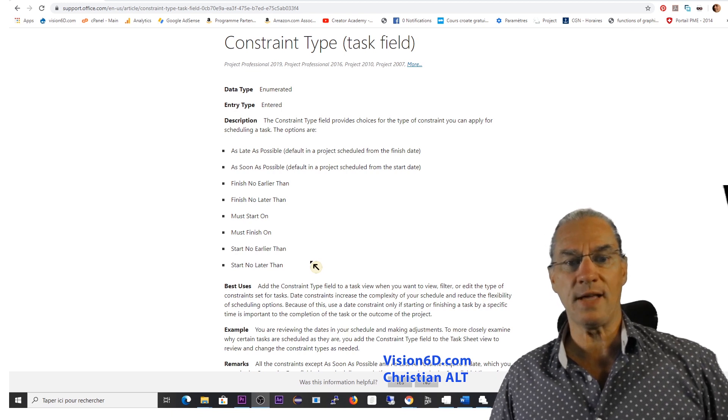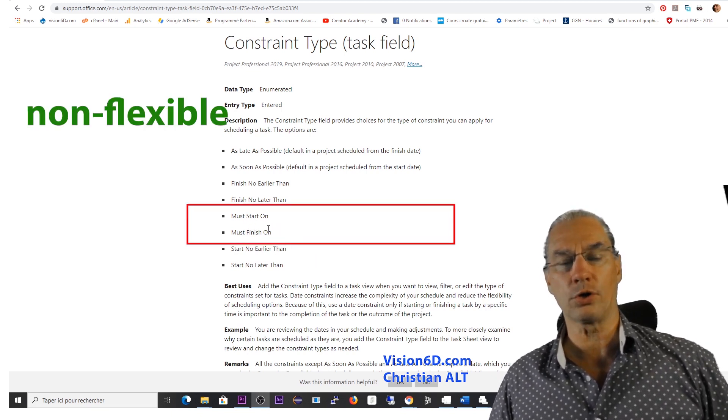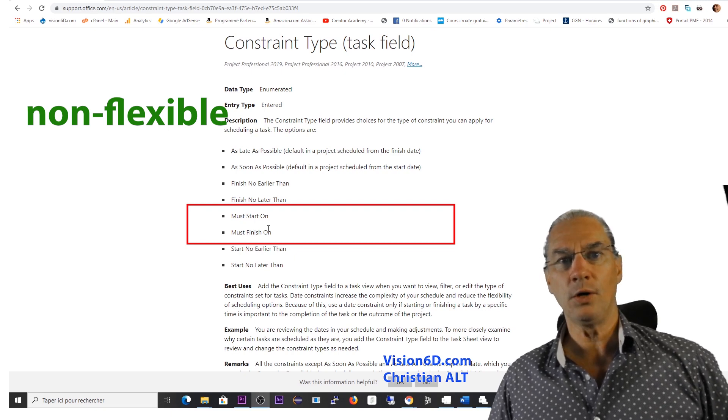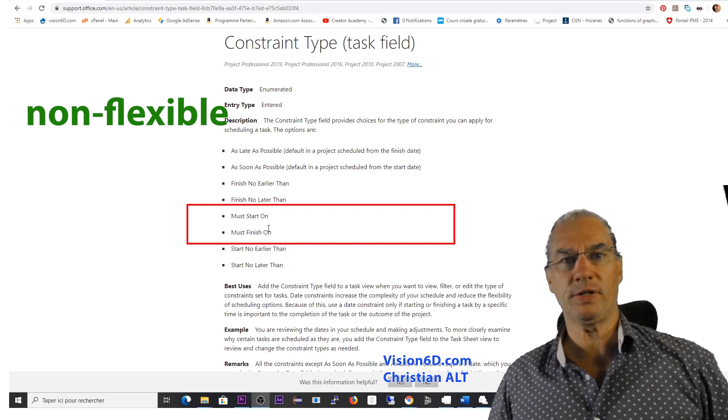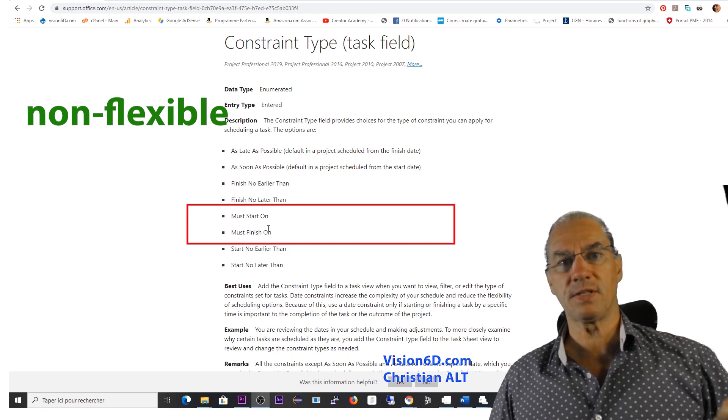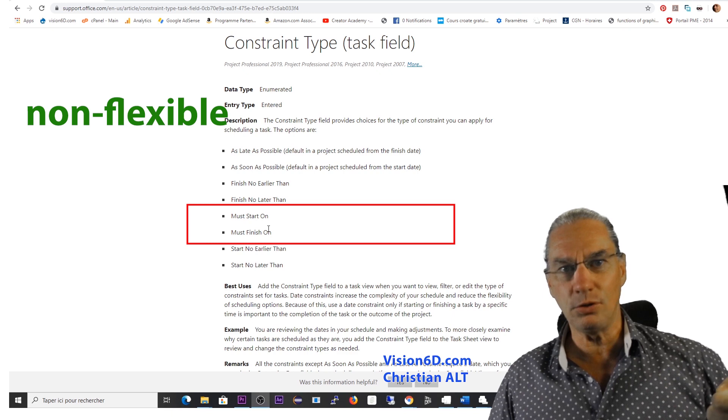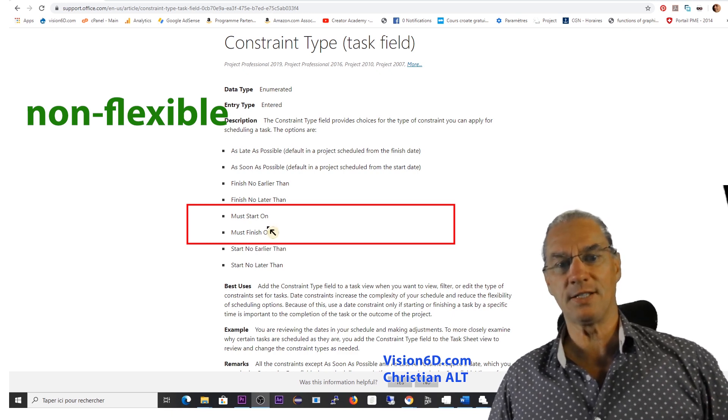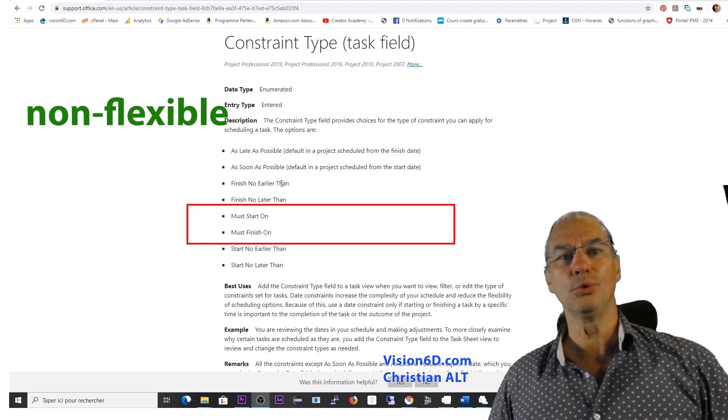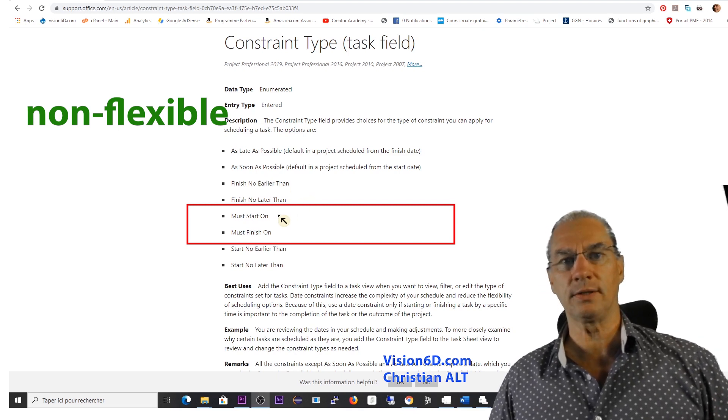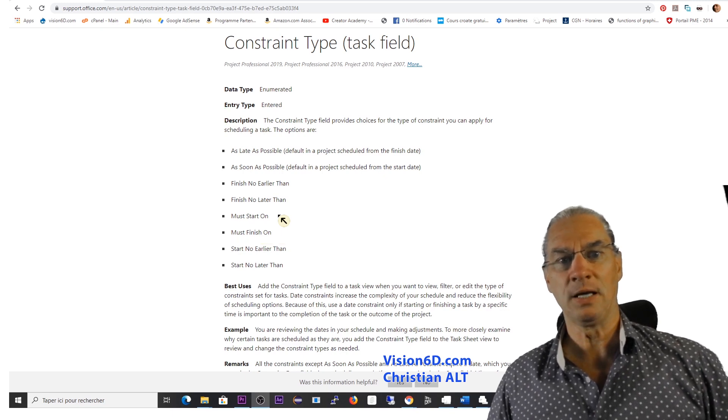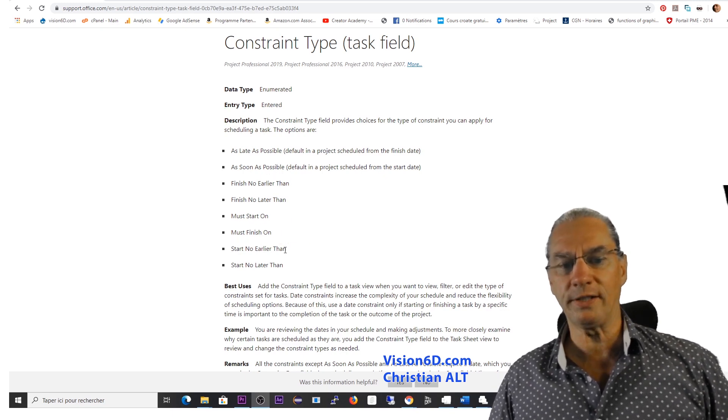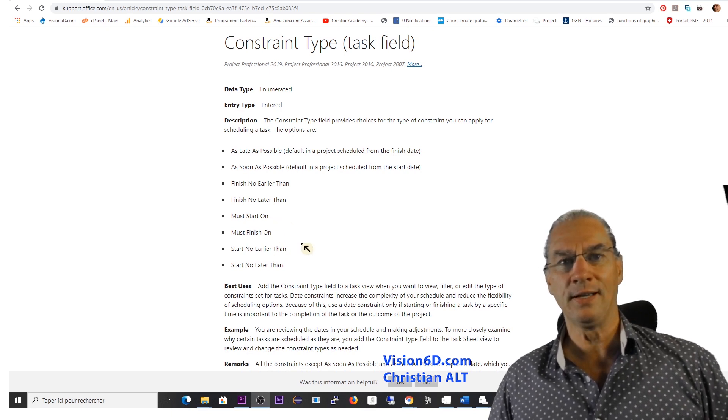To give you an example for the must start on, imagine that you are organizing a conference with many guests and many participants. So you said that conference must start on the 20 June. It's really a tough constraint. It's not as soon as possible. It's really the constraint must start on the 20 June. I let you try to find out some usage of the other constraints.